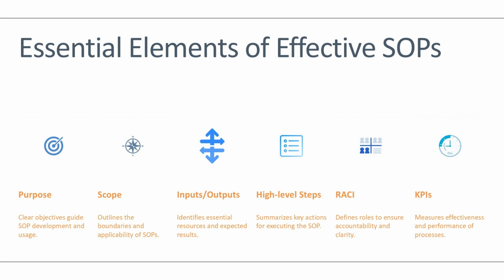And the third is inputs and outputs. Inputs could be drawings, BOQ, site condition, vendor document, etc. Output would be approved drawings, comment sheet. Very simple. And the fourth being high level process flow, at max 5 to 10 steps. This is the heart. Write steps like prepare, submit, internal review, submit to client, capture comments, revise and resubmit.